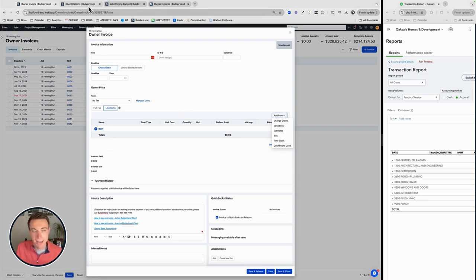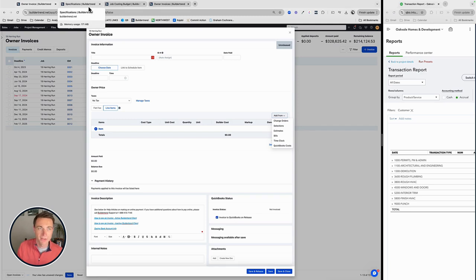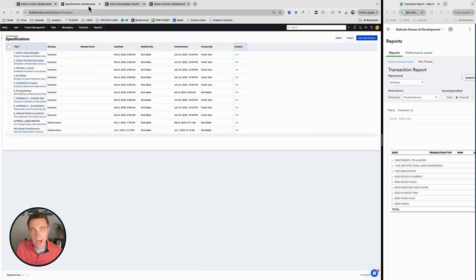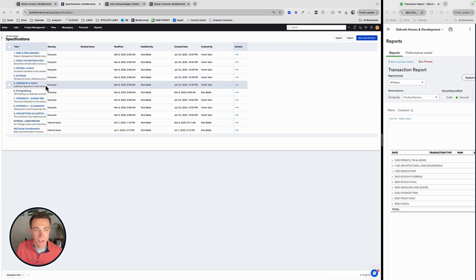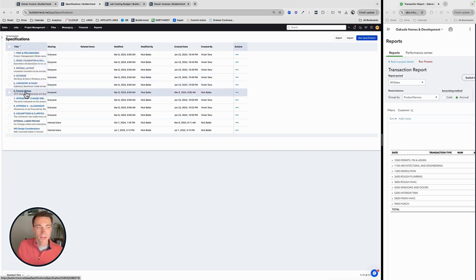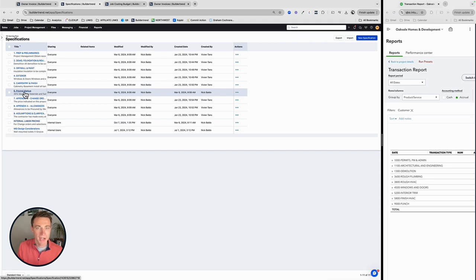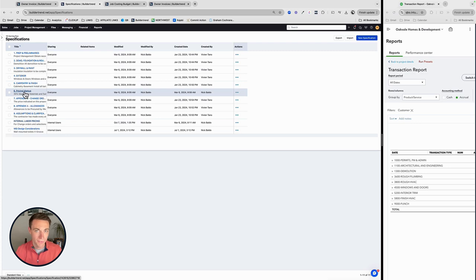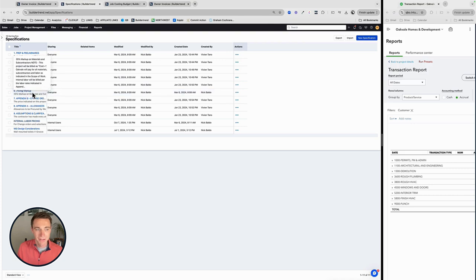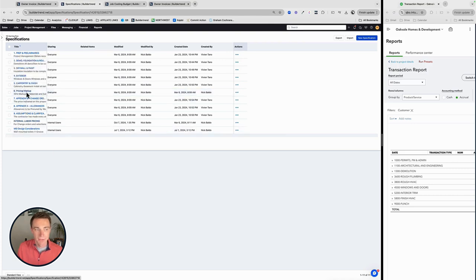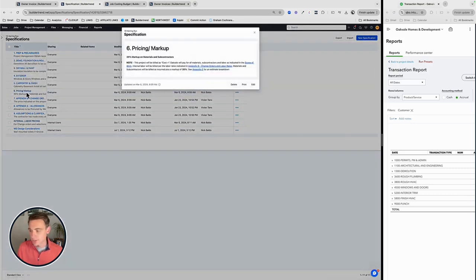And I find it is a really good place. I had a video on specifications a bit ago. I think that adding your markup in your specifications is a really good place. It's transparency for your customer, they will have known about it already in the contract, but also for your team. So if you have somebody else who's helping to create invoices, whether it's a VA, a bookkeeper, or just somebody else on your team, they can reference every project might have a different markup and it might be different for different cost types as well.